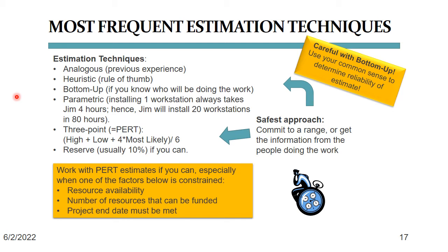Would Rajiv really admit that the task we're asking him to do is too challenging to complete in 2 times 3, that is 6 days? If you guessed never, you are most likely right. We all tend to overestimate our capabilities and underestimate activity durations. That is why good project managers always add at least 10% onto any numbers that they receive in a bottom-up estimating cycle.